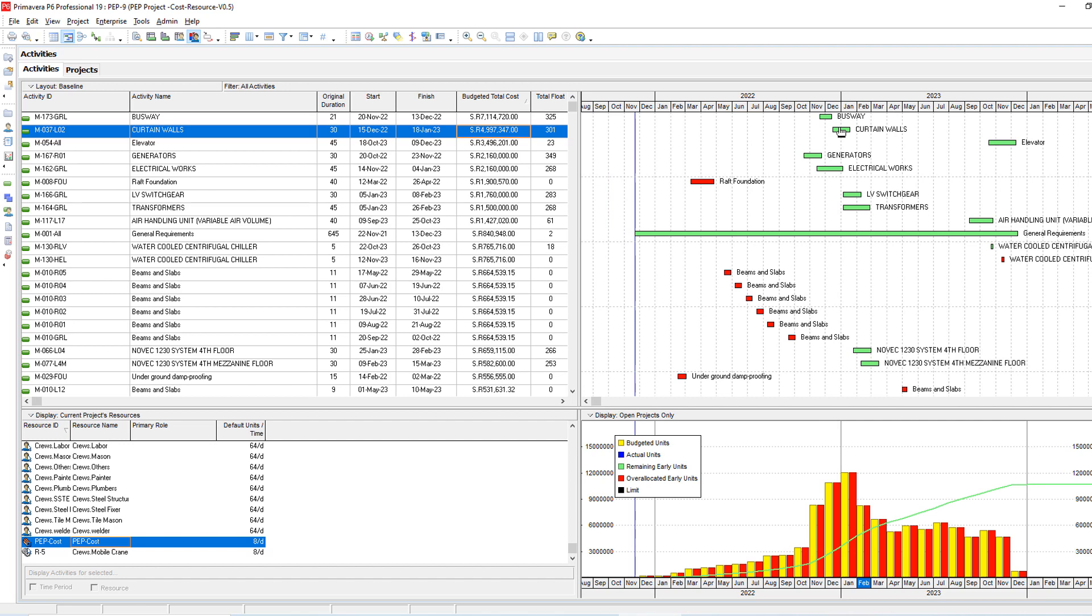What I'm going to do now, I know this activity is very heavy already. I need to push it from January to February or make it earlier. If I put some weight on December it will give me more weight in December, but if I move it to February it will give me less weight in December and less weight in January as well.